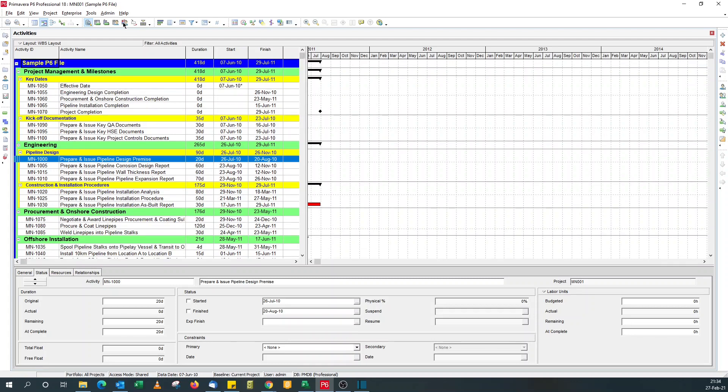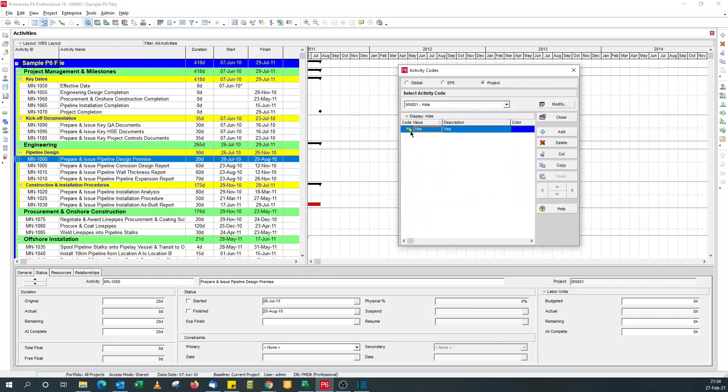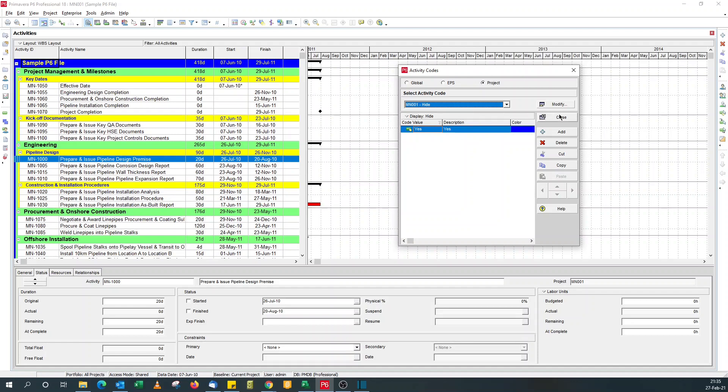So I can show you in this P6 schedule, I've got an activity code defined for hide. I use it to hide certain activities in the schedule that I don't want to show to recipients of my schedule.